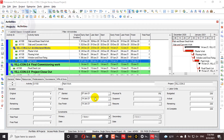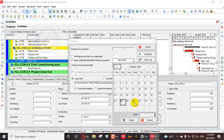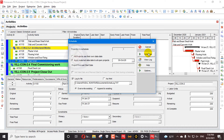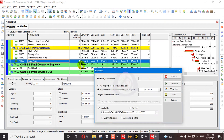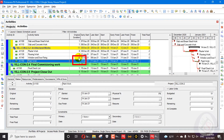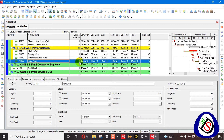I will assign the expected finish to this activity and see what impact it has. I run my schedule on 30th of October — you can see 4 days duration, 7th January start, and finish on 14th of January as the latest finish. When I schedule, the duration remains 1 day and the float decreases to minus 2 days. Whenever you apply your expected finish, it decreases your duration — instead of 4 days it goes to 1 day.